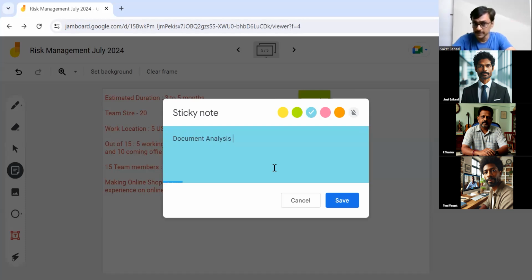Here we don't have it available, so we probably can do it. Other thing we can do possibly is a stakeholder interview. Say, I will call a product owner and say, product owner, you tell me what can possibly go wrong here. I may call a subject matter expert, maybe a technical architect, and say, we are using this technology. You tell me what can go wrong here.